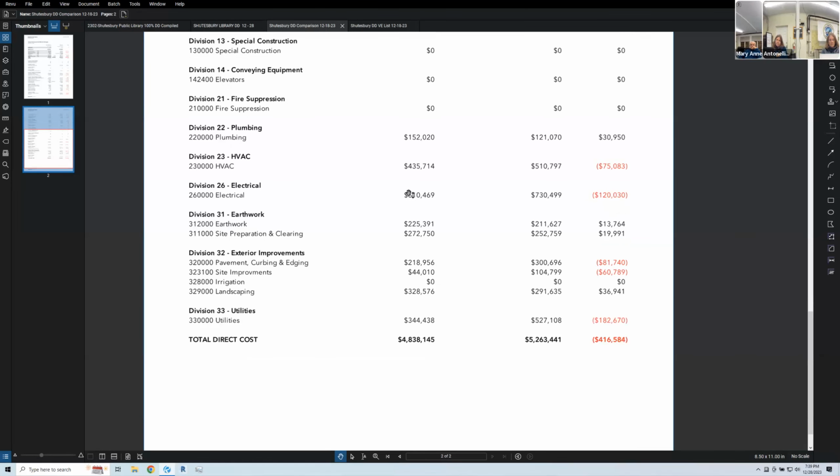Okay, let's continue. So earthwork, we were hoping to see a little more savings here. The intent for moving the project closer to Leverett Road was to reduce some of this work. I think as the stormwater system and grading flushed out, we needed the basins to really alleviate the stormwater design, so that we wouldn't use below grade Caltech system. It's a fine balance there. So we did see minor savings. Initially, we had hoped that these numbers would work in our favor a little more.